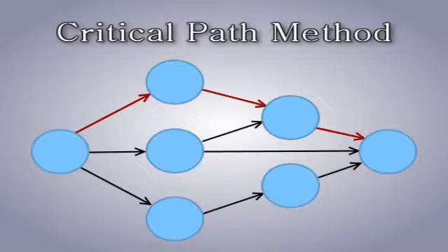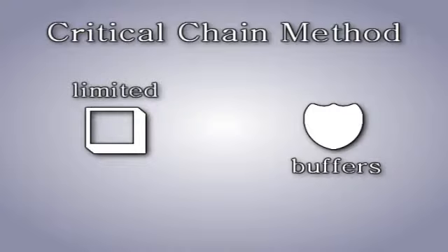The critical path method is a technique for process planning that defines critical and non-critical tasks with the goal of preventing time frame problems and process bottlenecks. It is ideal for projects consisting of numerous activities that interact in a complex manner. The critical chain method is a technique that focuses on limited resources when creating a project schedule and includes buffers to protect the project completion date.